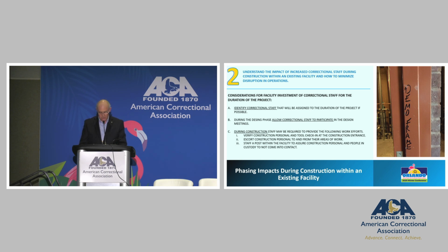And then during construction, tell the staff they may be required to actually verify the construction personnel for tool check-in and also for any type of construction entrances. They might be required to escort construction personnel to and from their work areas. And they may be required to man a staff post during the process to ensure that the construction personnel and the people in custody do not come into contact.